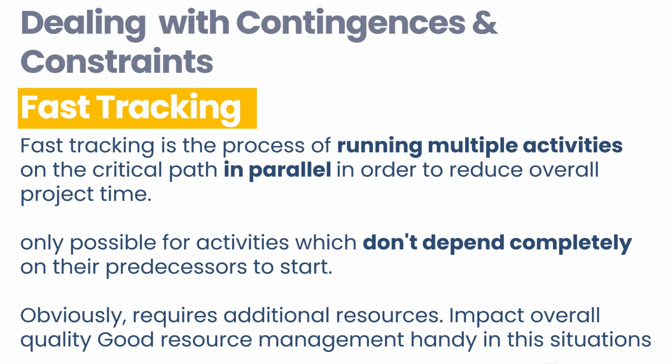So what you will do is you will do these activities in parallel. So let's say you have started some activities in sequence, right? That you will first do this activity, then you will do this, then you will move to activity C. So instead of doing it step by step, what you can do is start activities A, B and C in parallel from here, right? This process is basically known as fast tracking. So instead of waiting for an activity to start after this step, you start all of them together and try to complete at once, right? So this is what is meant by fast tracking.